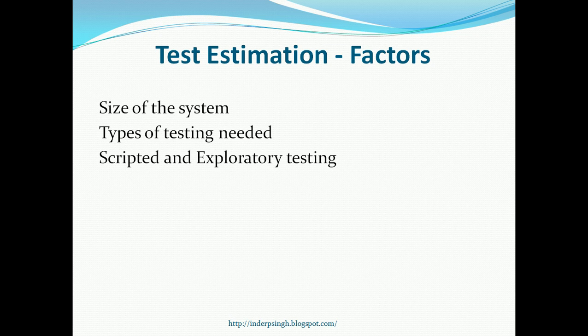Another factor in test estimation is whether we go in for scripted or exploratory testing. If scripted testing is being used, then we need to estimate the time it will take to create the test scripts that will be executed. And sometimes, or most of the times, both scripted and exploratory testing are used, so we need to estimate the time effort required for each one of these types of testing.